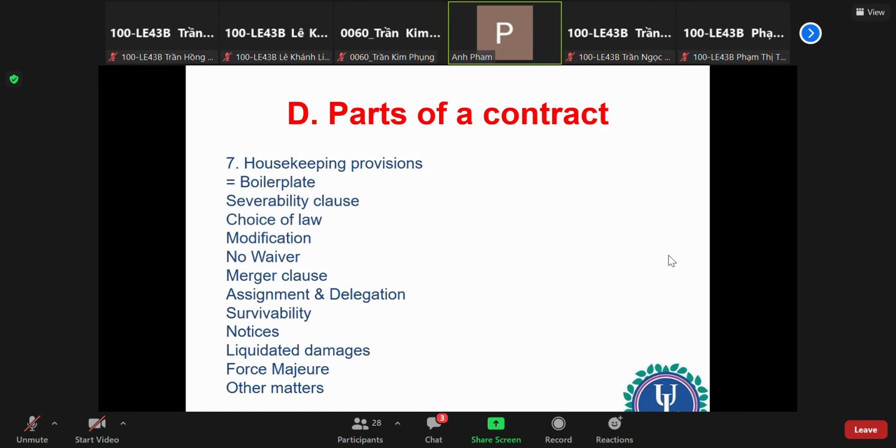We list out the events, and if not, it will be implied by the law. In the law, there are only two criteria we can base on to determine whether an action is force majeure or not. The first is that it is an unforeseeable action or event, and the second is that it is beyond the control of that party. So this is force majeure.